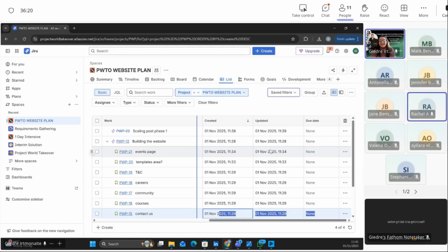I was going to say, I feel like at work sometimes we don't break down our plans like that, and it has burnt me a little bit as well. So I would highly encourage people to have those different columns: a column where the owner says they finished it, a column where the UAT or SIT team go in and say they have tested it, and then a column for the final sign off. It's made me think, as I'm currently creating a project at work.